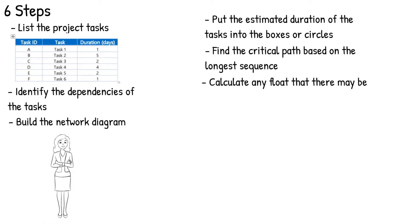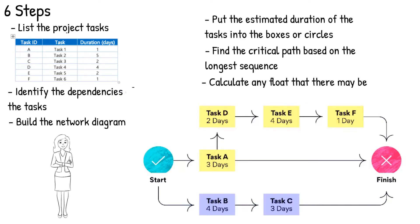Calculate any float there may be. Float refers to the amount of flexibility of a specific task — it indicates the amount of time a task can be delayed without impact on subsequent tasks or the project end date. It's important to remember that tasks on the critical path will have zero float. Based on our example, the network diagram would look something like this. The critical path is shown by the activities in yellow, and the activities in purple are activities that have float and are therefore non-critical activities.